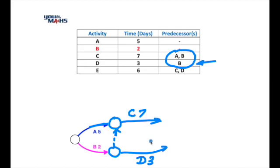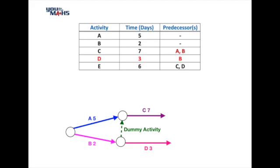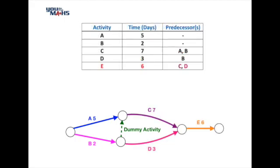Now let's look at how we complete the rest of the diagram. The last task to place is activity E, which requires predecessors C and D. So we bring the arrows together for the two activities C and D, place a node there, and E can come off that. There are no more activities to be shown, so that completes the drawing.